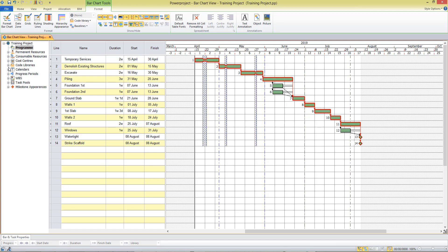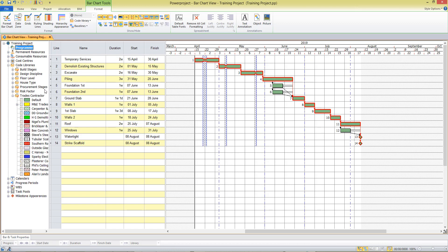The code libraries, which are available on the left hand side in the project view, are a way of colour coding our activities so that it represents something to us. We could colour code by build stage, design, discipline, floor level, whatever you choose. I'm going to use the trades contractor library here today.